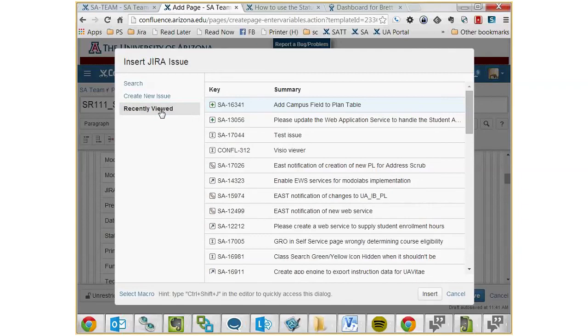One thing that you can do, I don't know if it would be useful here, is if you highlight a phrase and decide you want to make a JIRA ticket out of it, like a summary, and those things are in a table, it'll actually infer to create JIRA tickets out of everything in the table. I created 14 tickets at once that way, which was really cool.